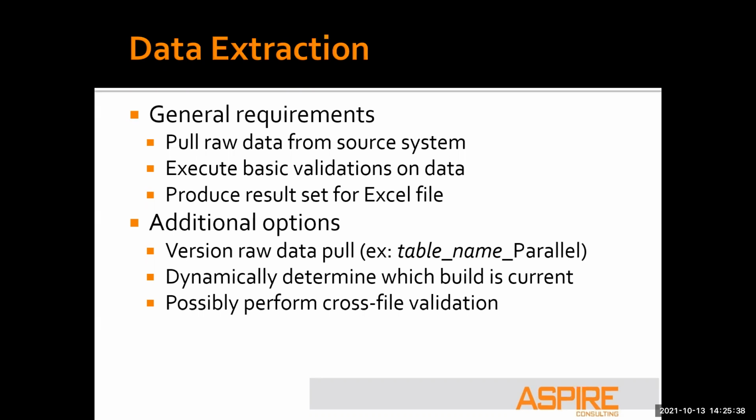And then this is a little bit more difficult, but as you're producing files, it's helpful to be able to compare a hire file to a service dates file. So you can say, I want to make sure that I'm not hiring anybody prior to their original hire date, right?